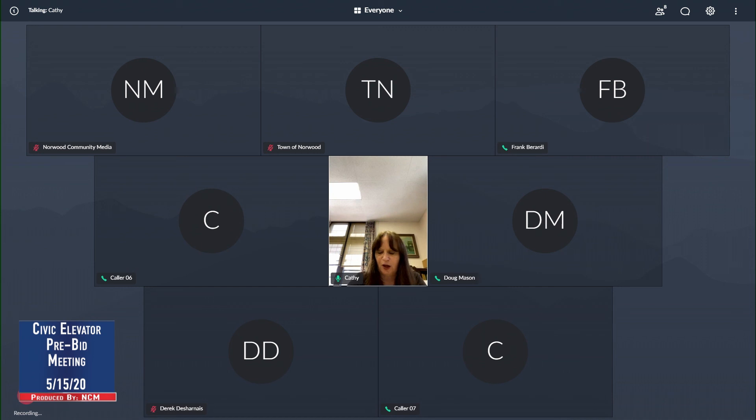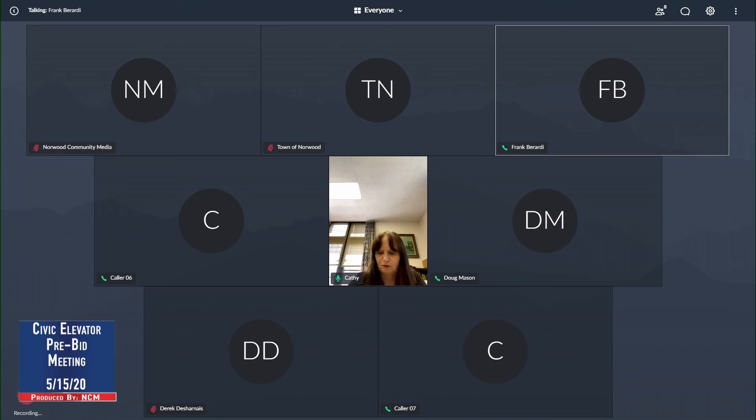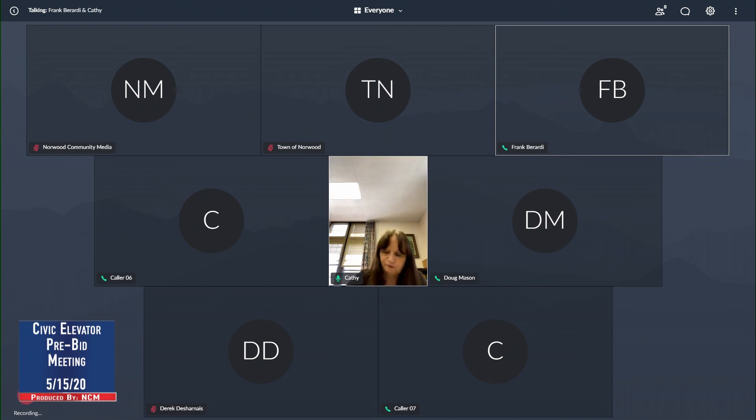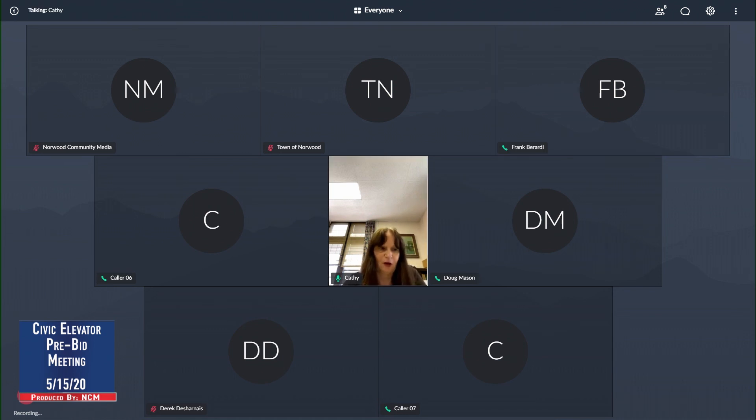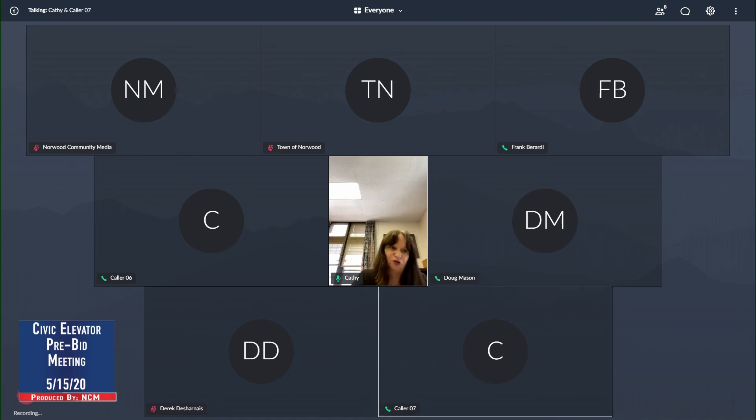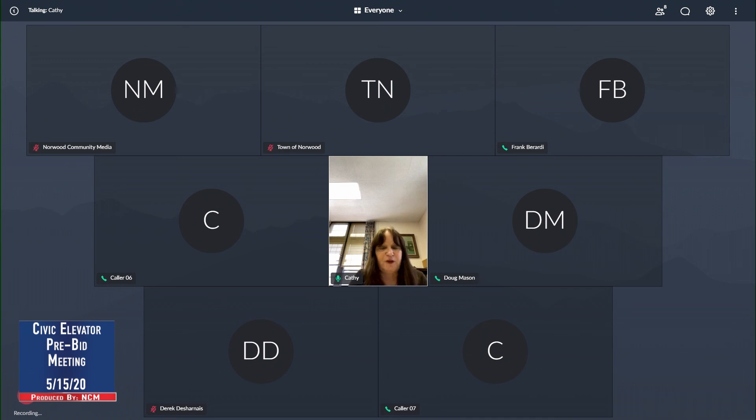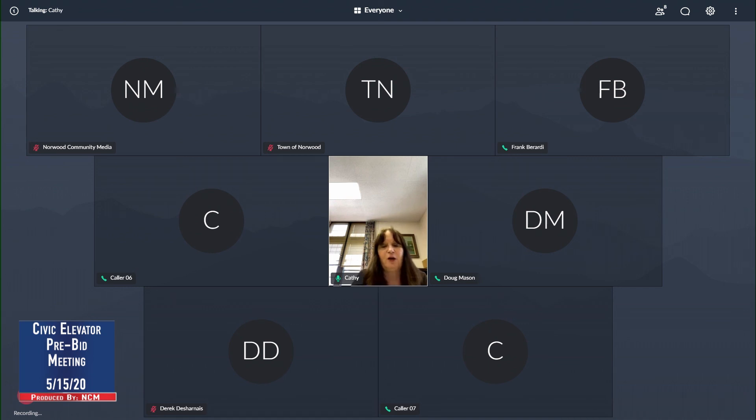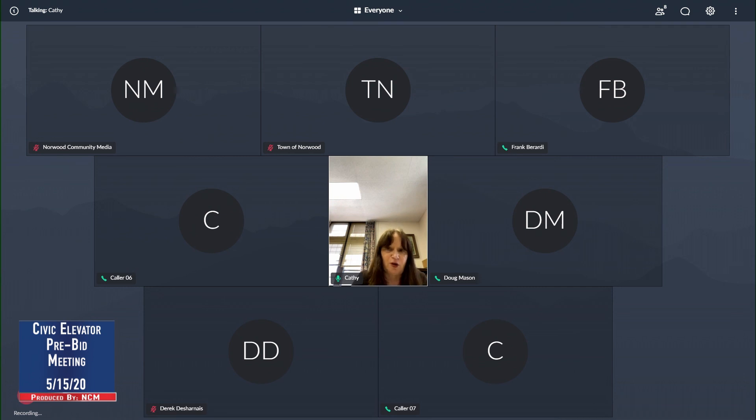I think, Frank, lead times, do you know what we're looking at for lead times right now? Well, I know down here in Connecticut, the current lead time, I just started another project there, and the elevator contractor said he had a lead time, I believe, of like 12 weeks or so. I don't know what the lead time is up there. So, given the strange situation with COVID-19, the fact that the building is closed now, but we don't know how things are going to be happening, the town will be willing to discuss what the construction time is. We can always talk about extending any of the construction completion dates. But according to the specifications that we have, any adjustment in the amount being billed in the contract amount would be subject to negotiations. So, we know right now that COVID is going on. I don't see that as any kind of an issue. You should consider all the facts that we know right now when you're submitting your bid.